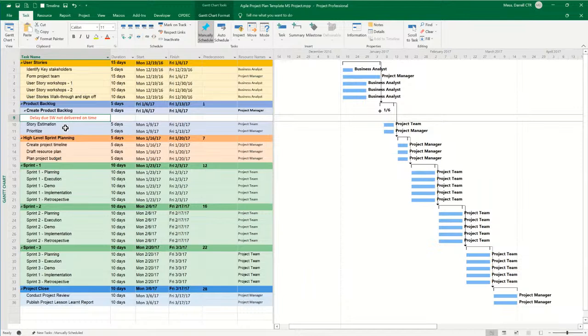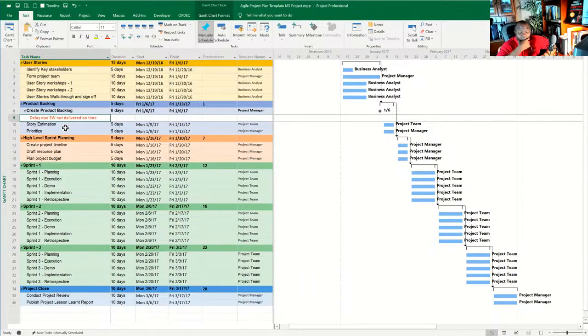So it's not a problem if you assign 6 installers, because it knows it's 600%. So if at the end of the day you're saying 48 hours assigned to installers for a day, the 48 hours isn't going to show as over allocated if you say you've got 6 resources. But if you've only got 1 or 2, then of course it's going to max out. So there are many ways to skin the cat, right, Darrell? There are so many alternatives once you know how to bend the tool.